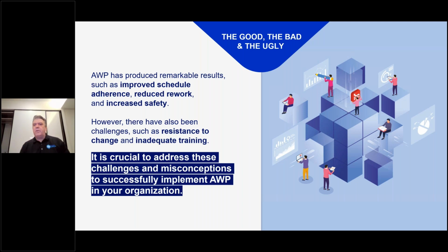As you get down below that, trying to put things into a schedule, particularly a scheduling tool that does critical path methodology, makes no sense at that point, because your plan needs to be agile, needs to be able to change. If I'm changing my plan, which I want to be able to do, I want to send work to the field that's executable. That's the key point. We shouldn't be putting IWPs into a P6 schedule. I've seen projects do it. It creates a mountain of grunt work in trying to maintain that schedule.